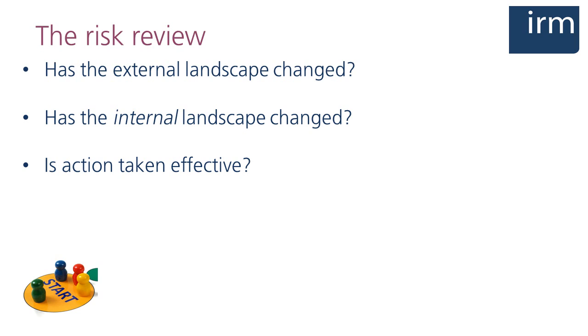Now, some of the projects I've worked with in the past have decided to mount a major communications programme to address the risk of people not being bought into the proposals, and yet the risk score never changed. If that sort of thing happens to you, you really need to ask yourself whether the communications are effective. Why waste time and money doing something that isn't working? And once you've completed your risk review, remember to update the risk register.